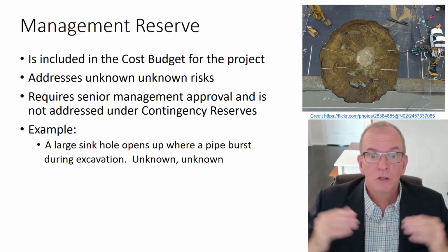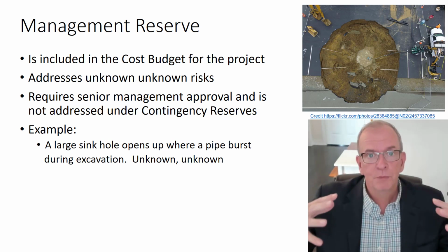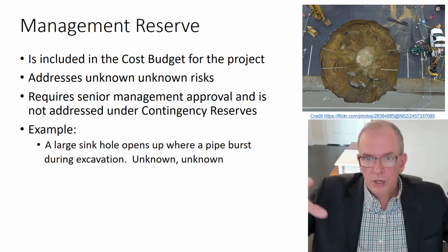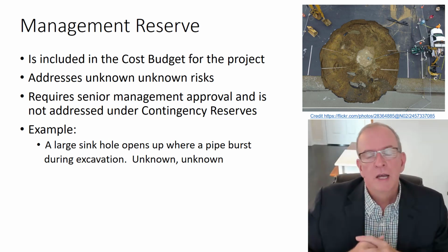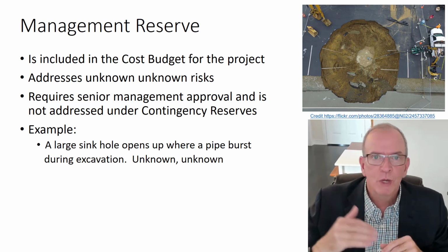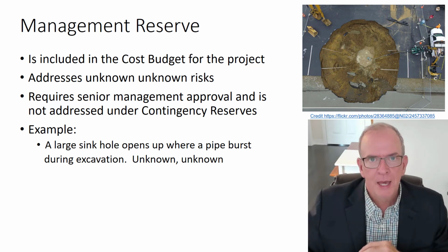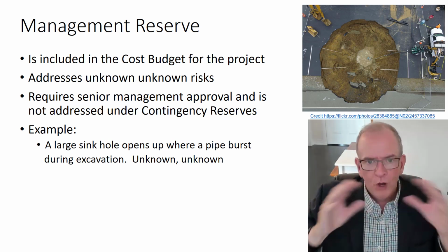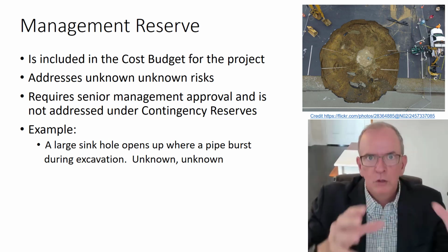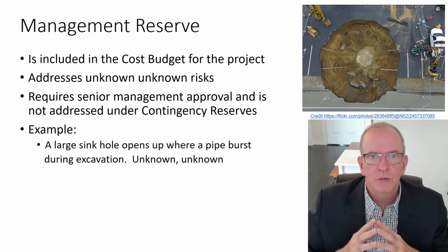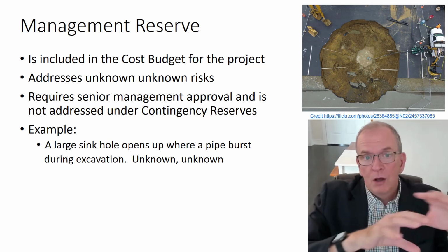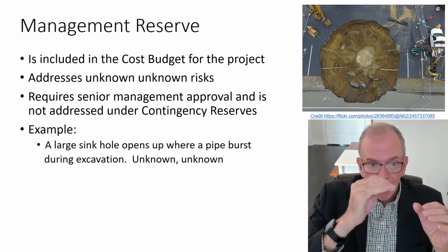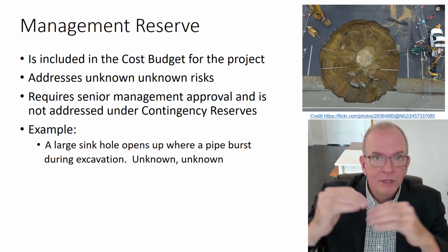The management reserve is, well, I'm the project manager for this project. There's a construction manager and there's a vice president, and they're looking after a portfolio of projects. More senior management then gets requested for money from the management reserve. So in other words, you're identifying this event, wasn't known, and we're drawing upon that as a result. And so good, you can also keep that money aside and know what it was put aside for. And now that's being drawn upon, what was the event.